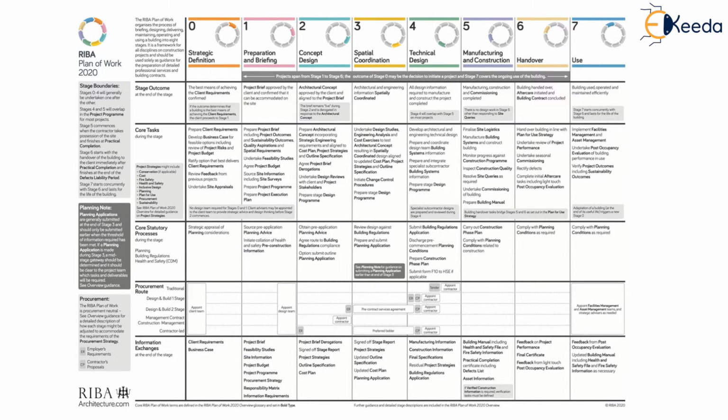As you can see, the strategic definition stage gives what the client requirements are, the business case, the budget, the project risk, etc. is all noted. Next, the preparation and briefing stage starts, wherein the major initial project brief is signed off by the client.